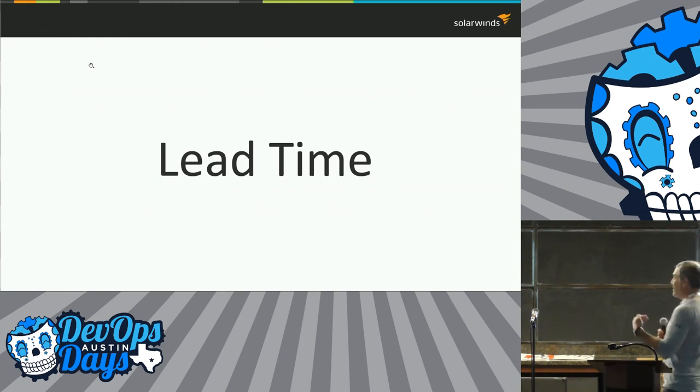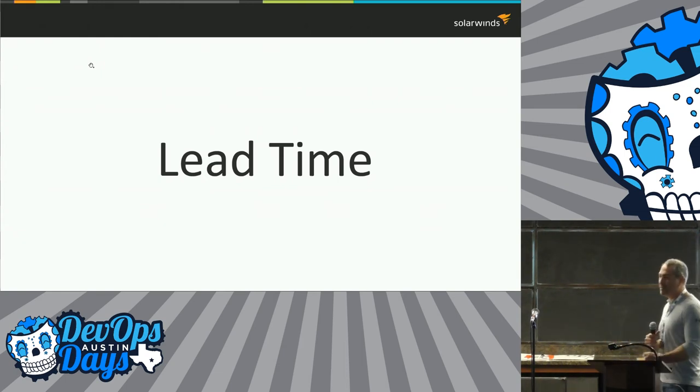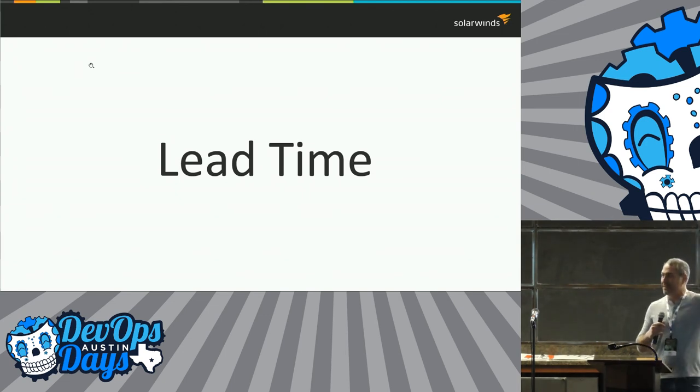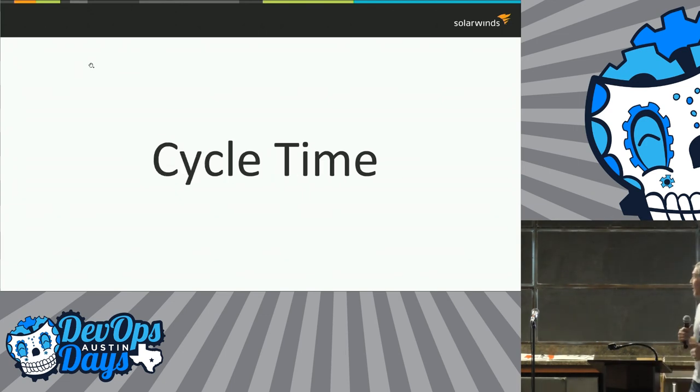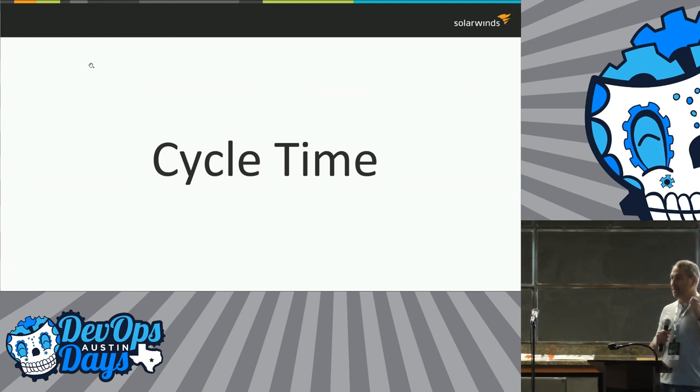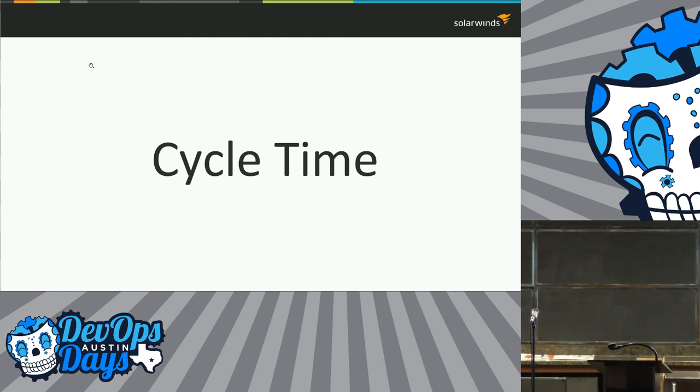That 14 months out garbage, that's not real. But if I can measure my lead time, which is the amount of time it takes from when work is entered into the system until it's actually delivered, or my cycle time, which is how long it takes from when work has actually started to when it's delivered, or if I have a Scrum team, if I can measure the team velocity, then when somebody asks when can you get this delivered, I say...